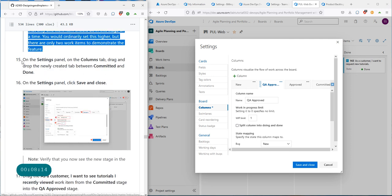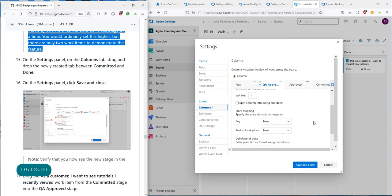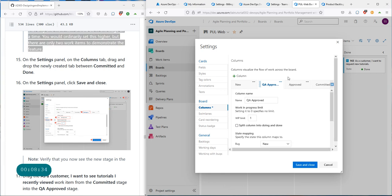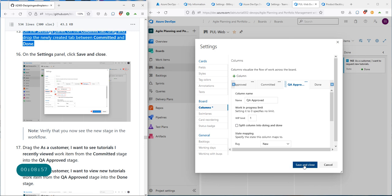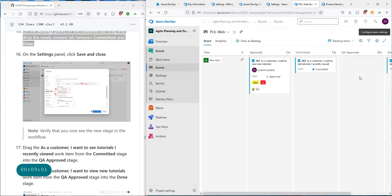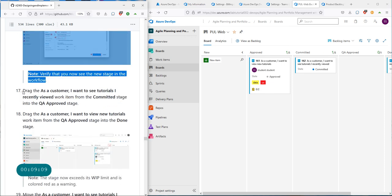The work in progress limit of one indicates that only one work item should be in this stage at a time. You would ordinarily set this higher, but we only have two work items to demonstrate. On the settings panel in the columns tab, drag and drop the newly created QA Approved column between Committed and Done. Now save and close — a new QA Approved column should appear between committed and done.